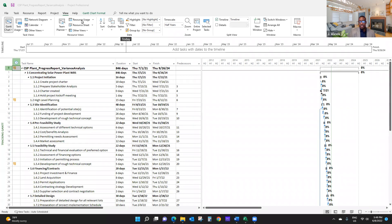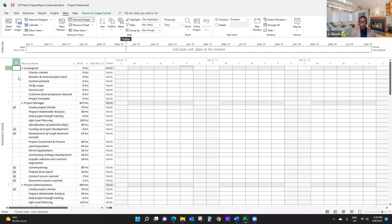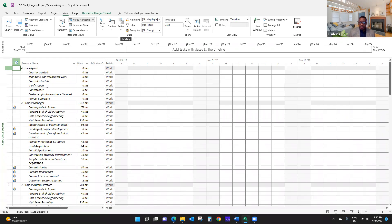A good baseline means that all project activities and work packages have resource assignments. For example, if you take a look at resource usage here, you can see where you need assignment. On the unassigned, you should only see milestone activities or milestones. They are not real activities — what we call milestone tasks. A milestone is a schedule marker; it's not a real activity. You do not assign resources and they have zero duration. So this is actually pretty good.